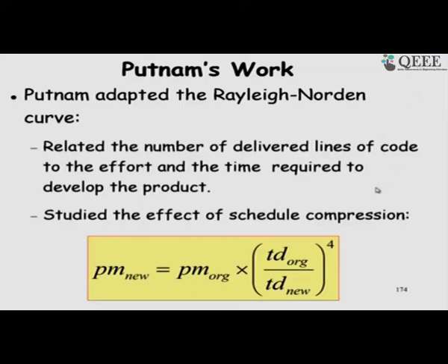The answer is that once we try to reduce the development time, we have to employ large manpower, and then we cannot give them work all the time. So, they will be mostly idling. In the nominal effort equation, all developers are busy, and that is the least effort it takes, in the nominal development time, that is the original effort. If we want to reduce the development time, we will need a disproportionately high effort, because we will not have that many parallel activities to keep the developers busy.